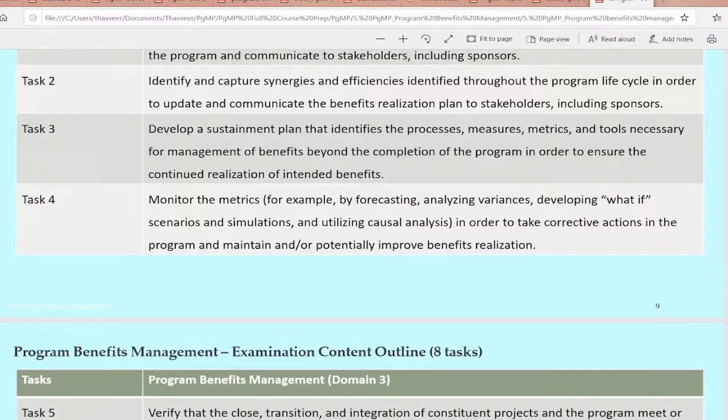Quantitative risk analysis. So here, for example, if you want to predict the probability of finishing a project on a certain given date, the simulation will run a number of times, maybe hundreds or thousands of times, with various different scenarios. And it will tell you there is an 80% chance of finishing the project by December 30.